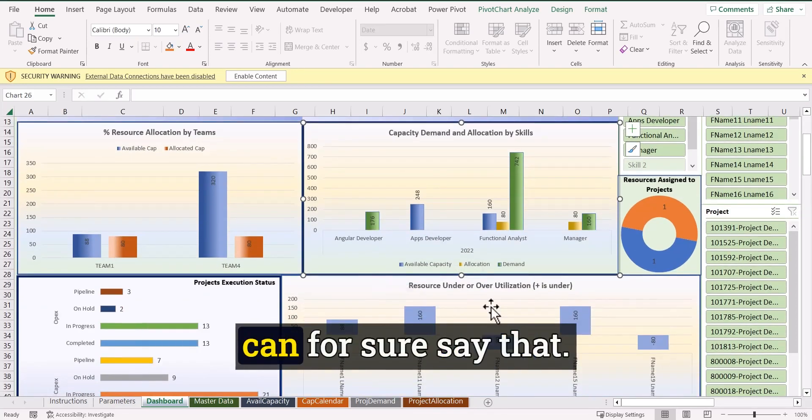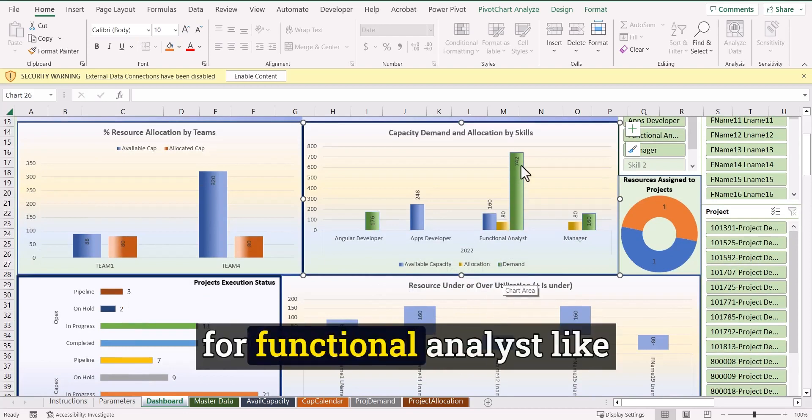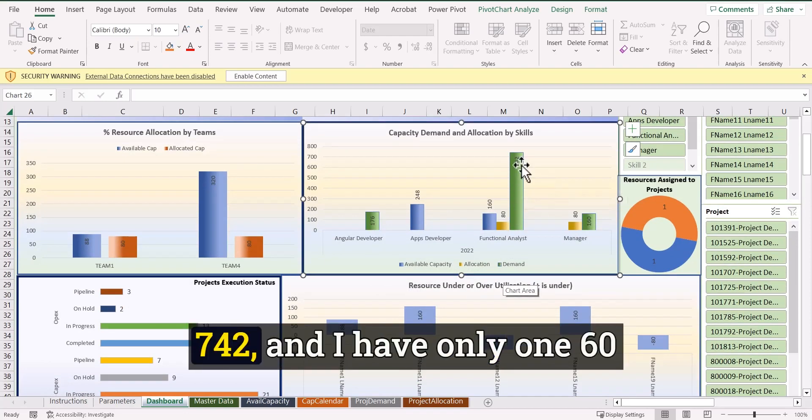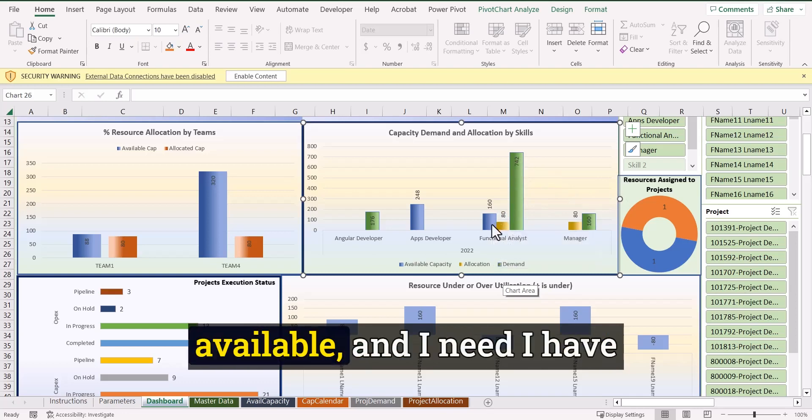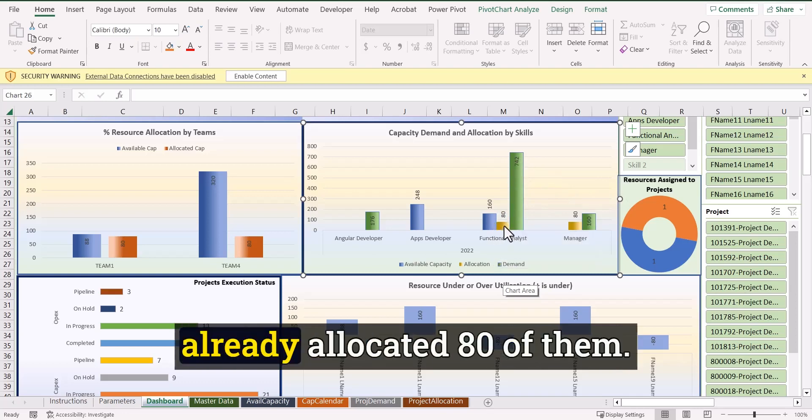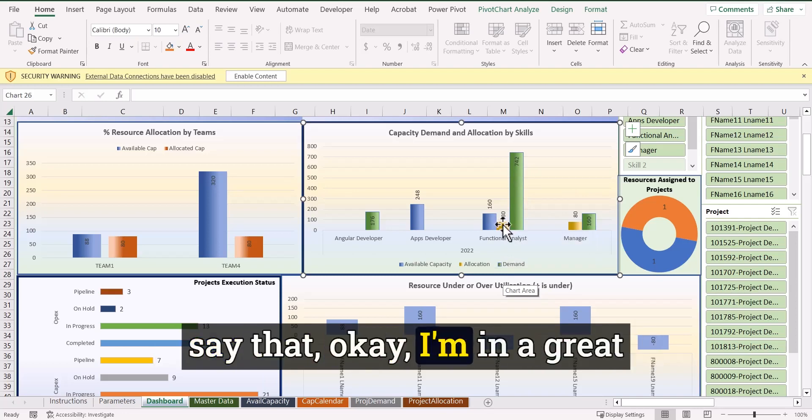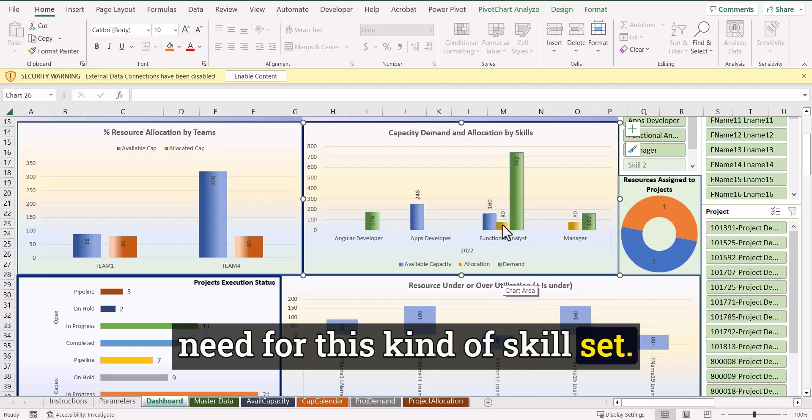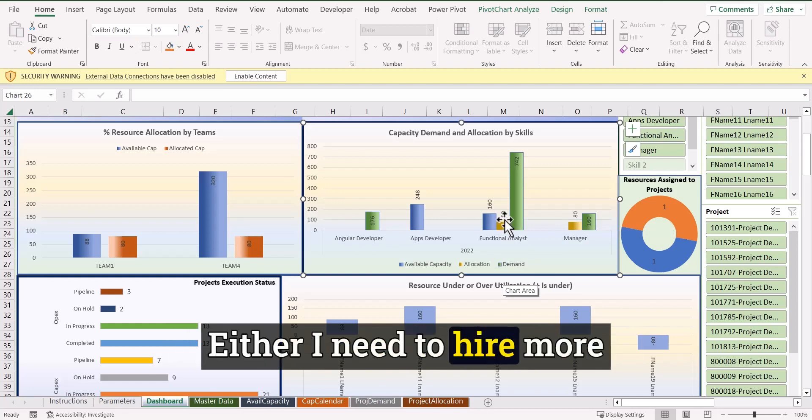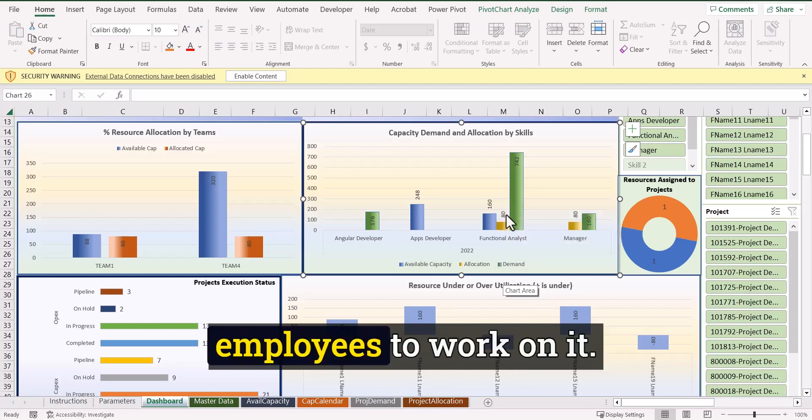So based on this, you can for sure say that, okay, I need, I have a demand for functional analysts like 742 and I have only 160 available and I need somebody allocated 80 of them. So by looking into this, you can say that, okay, I'm in a great need for this kind of skill set. Either I need to hire more people or get some contingent workforce to work on it.